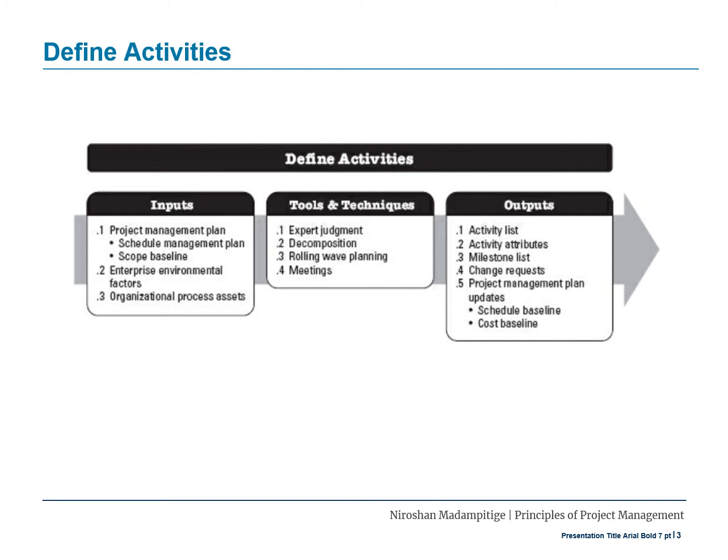The schedule management plan defines the schedule methodology, the duration of waves of rolling wave planning, and the level of detail necessary to manage the work. The project work packages, deliverables, constraints, and assumptions documented in the scope baseline are considered explicitly while defining activities.